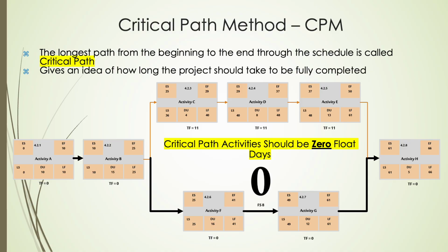The detailed arrangement of values also enables easy calculation of both total float and free float for non-critical activities. For instance, activity F shows no difference between ES and LS, implying no available float, aligning it with critical activities temporarily. However, activities like C and D exhibit clear float, where their LS is later than their ES, indicating potential delays without impacting successors. This visualization aids project managers in targeting efforts on the riskiest activities while efficiently allocating resources elsewhere.